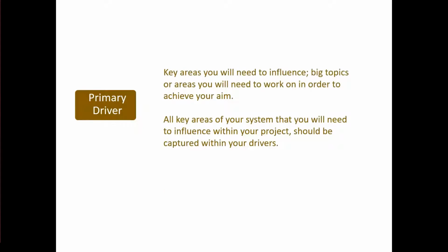So primary drivers are those big buckets or big topics or big areas that you're wanting to work on in order, and that will need to happen in order to achieve your aim. And those key areas of your system that you'll need to influence within your project should be captured within your drivers. So thinking about those key areas, larger buckets, those become your primary drivers. To start, you may make some adjustments to it, but to start, that's how you can develop your primary drivers. And they help you identify what your process measures may be.